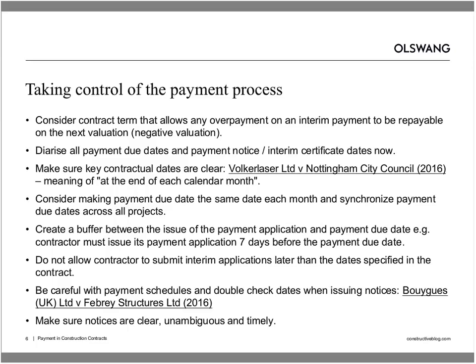The contractor later complained that the employer was not entitled to issue its notice later than the 20th, and the court agreed with that and said that the schedule contained an obvious error, and therefore the employer's notice was out of time. Again, I think quite tough on the contractor. After all it had done was to follow the schedule that the parties agreed, but I think does highlight the importance, certainly if you're putting together these sorts of schedules, to double and triple check it to make sure that there's no problem with it.